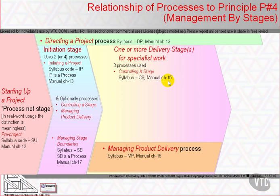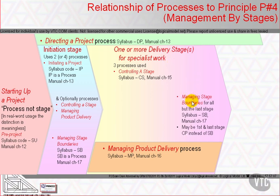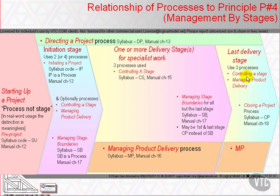At the end of a delivery stage, we either close the stage using Managing Stage Boundaries — used for all but the last stage — or, if the first delivery stage is also the last, we use Managing Stage Boundaries once at the end of the initiation stage to enter that delivery stage, which then uses Closing a Project to close it down. There is much detail still to add to complete this picture.